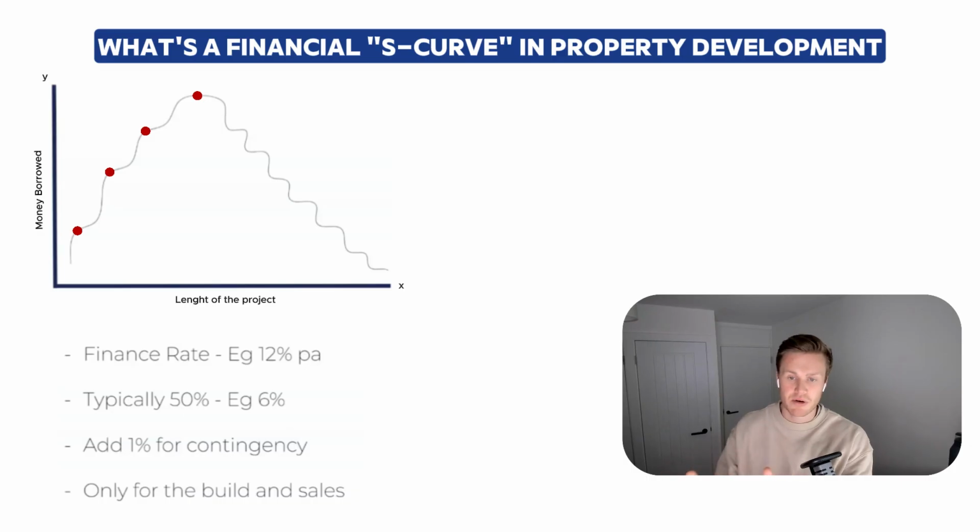total amount you're borrowing, like 300k and build, for an example, times it by 6%, add the contingency on, so times it by 7%, divide it by how many months you've done it, and then get your monthly rate of that cost. So if it's taken 12 months, that'll be 7% of that total 300 grand that it's cost you. So that adds on to your purchase finance and all the other finance costs that are in there. I hope I explained that okay.